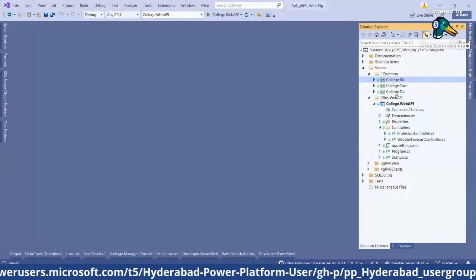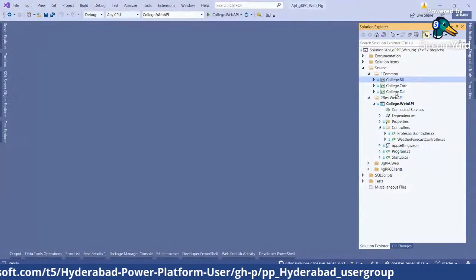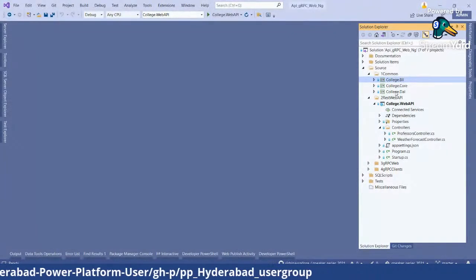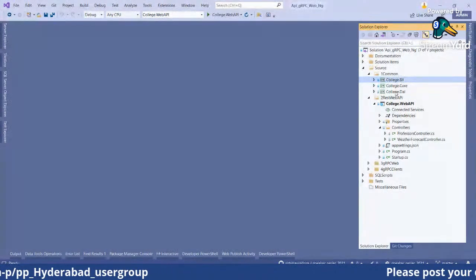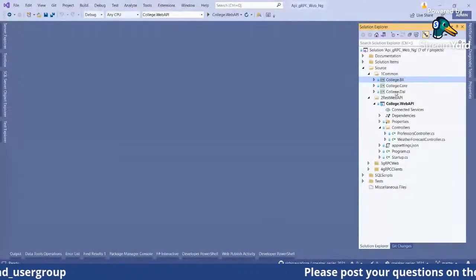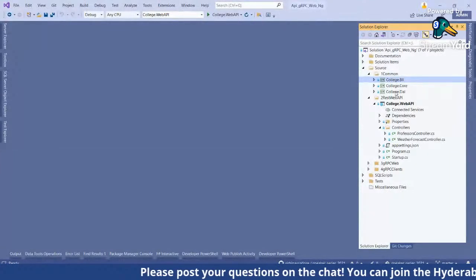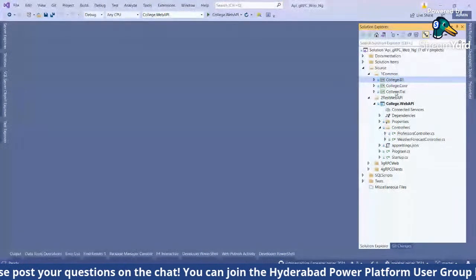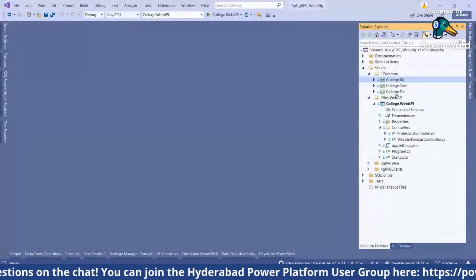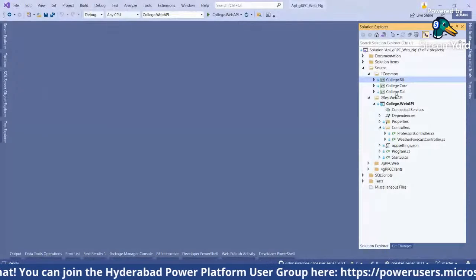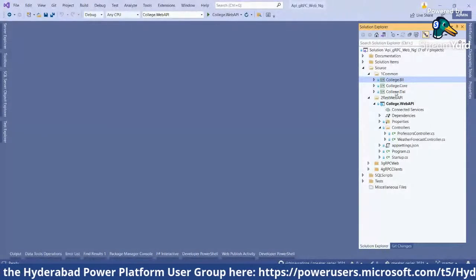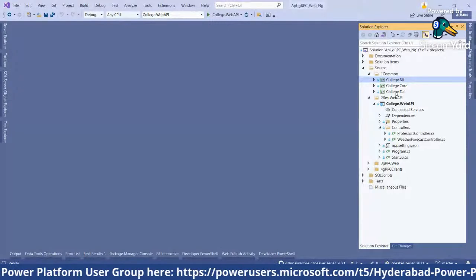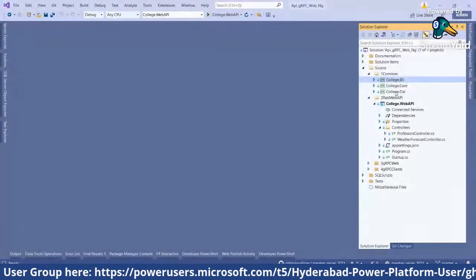And most of the companies, or some of the companies, definitely call for a change control board before they make a breaking change to the existing library. Because let's assume Ritika, Yash, and me belong to three different teams, and we are using a reusable library developed by Manish. So if Manish wants to do a breaking change to his library, all three teams, whichever are using his library, will get impacted.